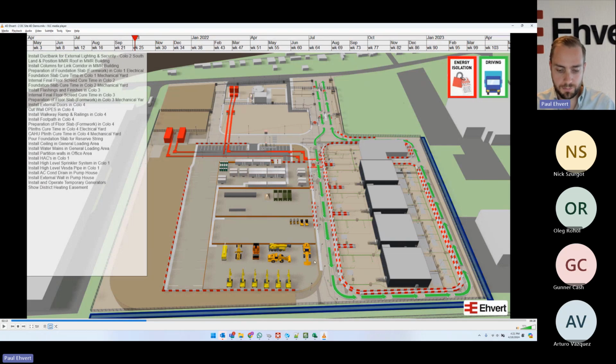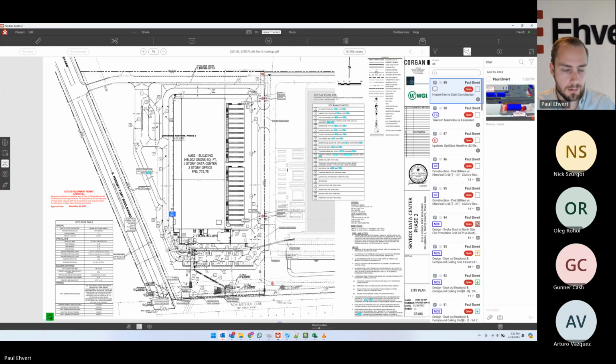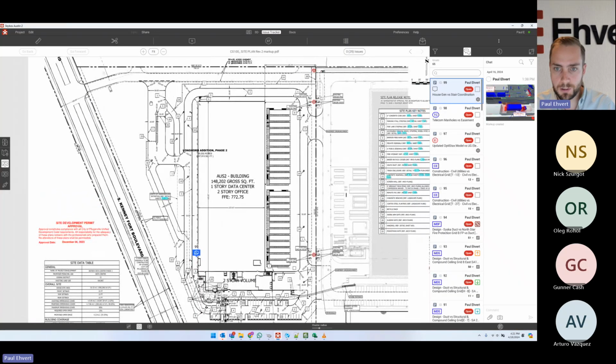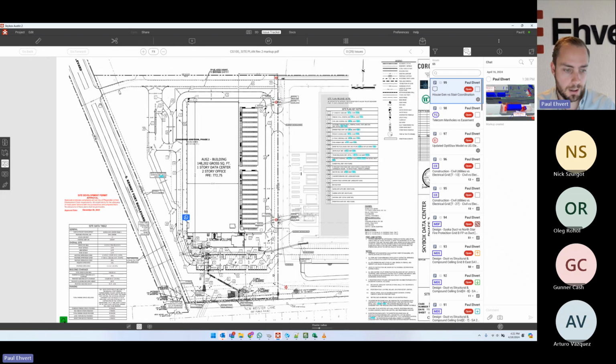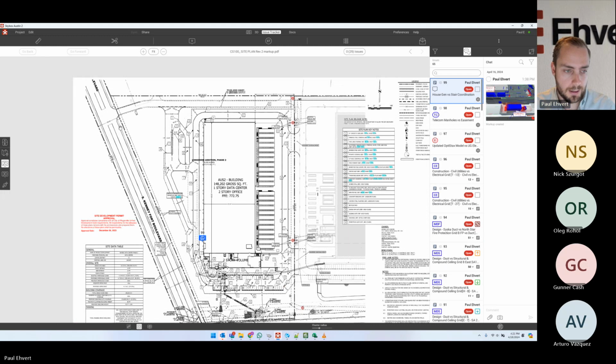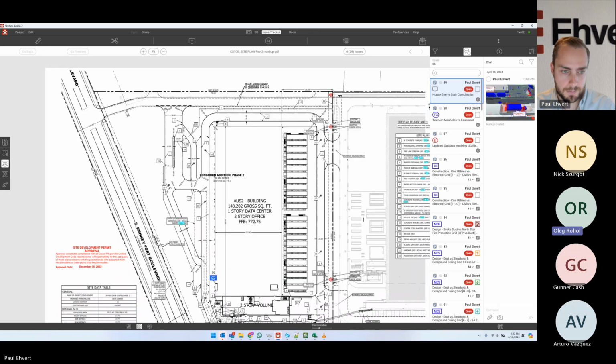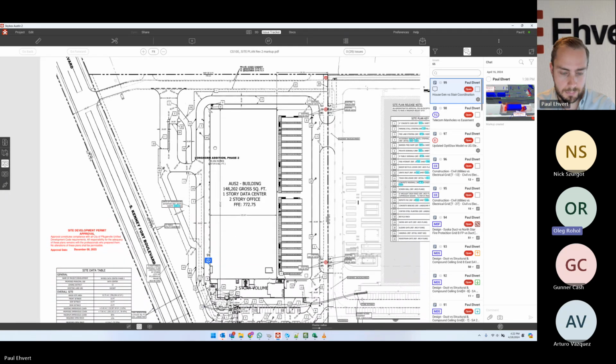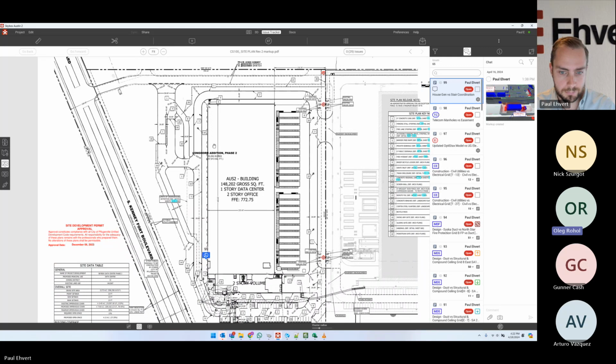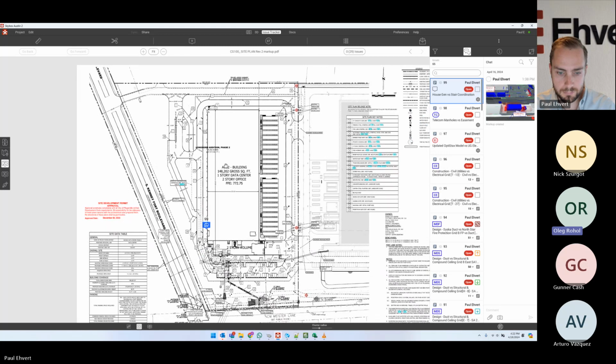So in terms of sequencing for the OptiStacks, my first question, and some of these questions may be self-explanatory, but it's helpful just to make sure I have that clear. As they're coming in to the site, how are they coming in? Do they come in off Kenny Fort? They're coming by 3 groups. If you see the map, those will come out by 3 groups, and the installation will begin from south to north, because we have phase number 1 on the south.